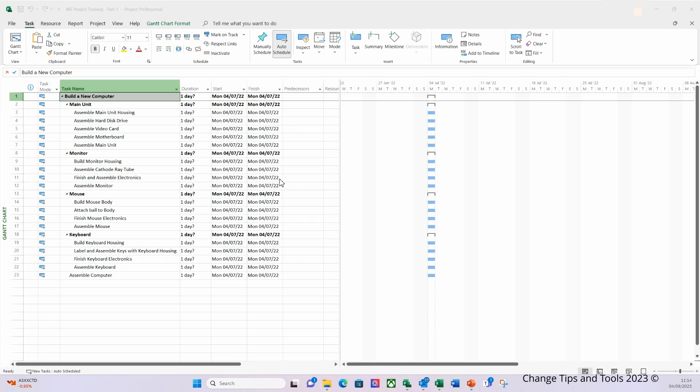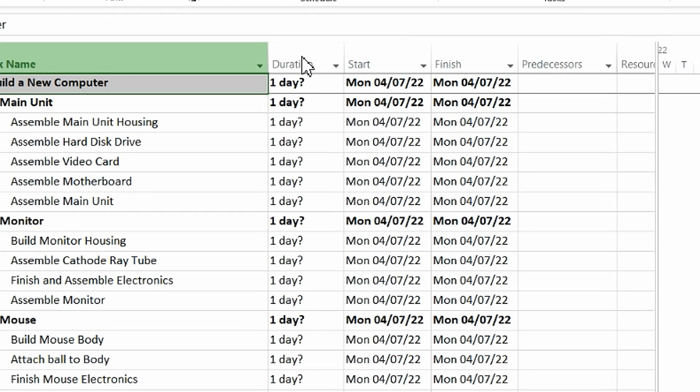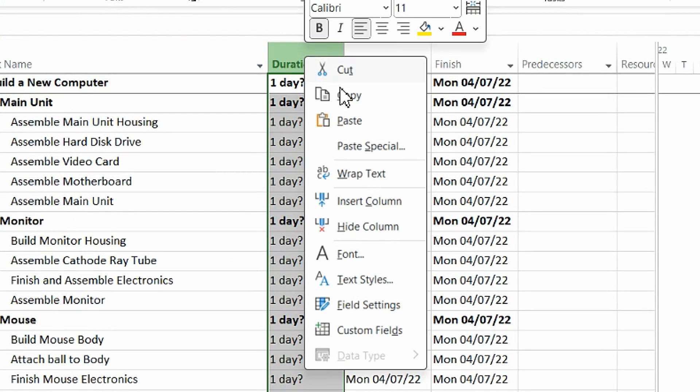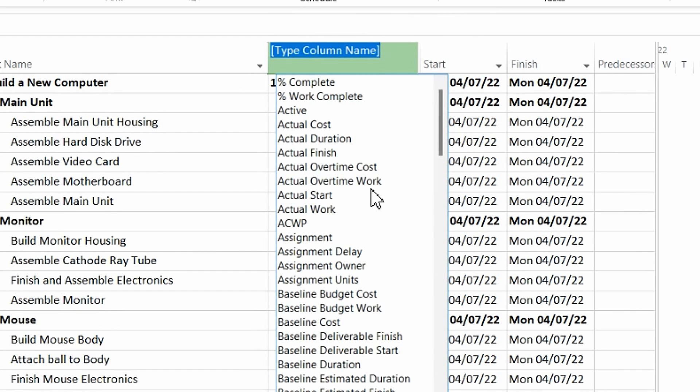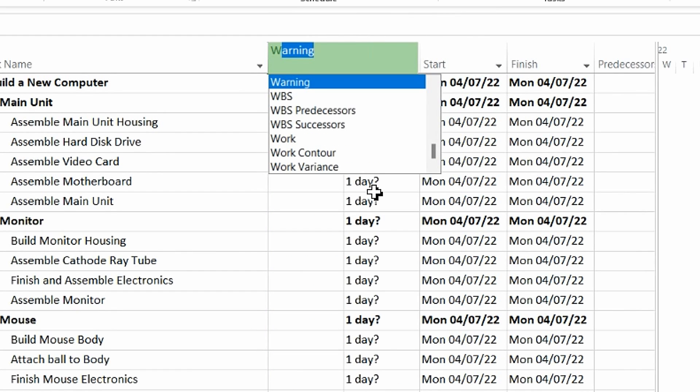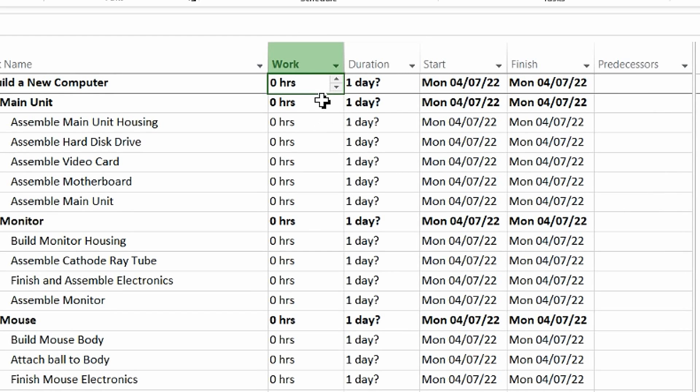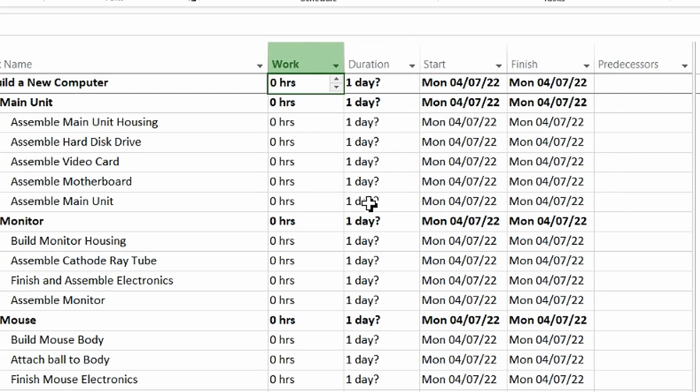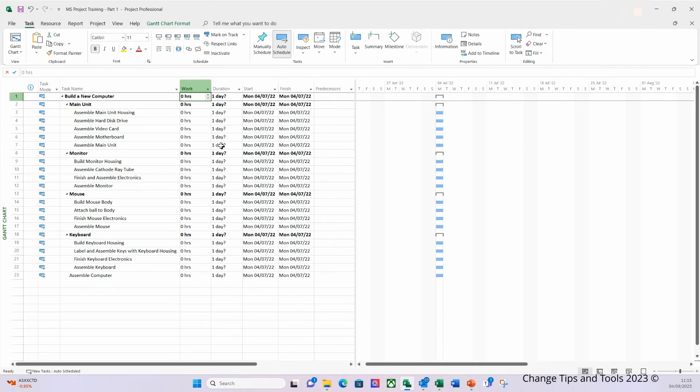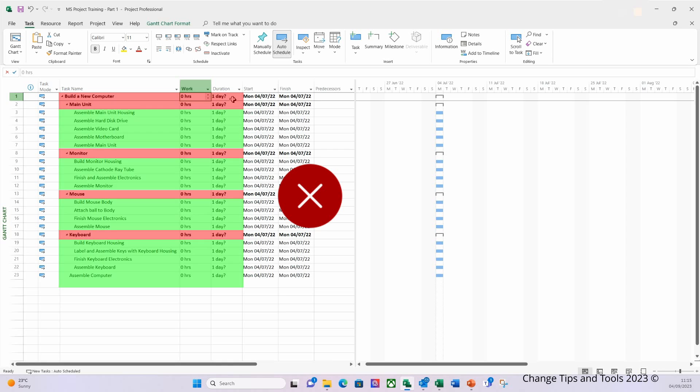So I'm going to right click on the duration column. I'm going to click 'Insert Column.' I'm going to type 'Work' and select 'Work' from the drop down. Now the work column is visible. Then we're going to enter some expected durations for the main unit. Now an important thing to say here is do not enter values at a parent or subtask level for duration or work estimates as these are calculated based on their related child tasks.